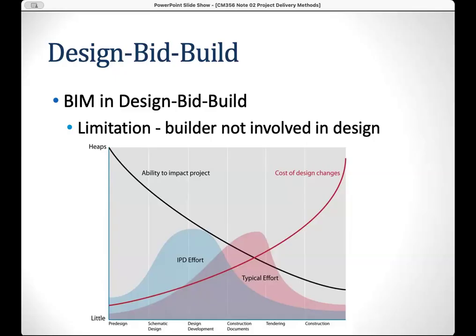And if we involve BIM later in the project, then the cost of design changes will increase. As we learned from lecture notes one, BIM is a way to help you make decisions early, at the very beginning of your project phase. So if we make all those design changes later, it will cause our project costs to increase, right? As you can see from here, that is what I just wanted to mention about this red curve over here.